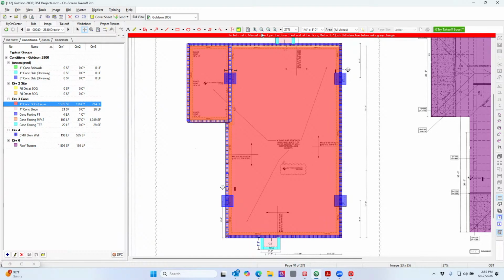So to your point, you're looking at a certain level of detail for that. I would still use my 126 cubic yards of quantity. I would just make sure my price covered my unit rate. So instead of figuring 20 bucks a yard just to haul and transfer that field, maybe I'm figuring 30 bucks a yard, and that's going to cover whatever compaction I need. So you can go either way, however you want to do it. If you just want to add the waste on there, you can do it that way too.